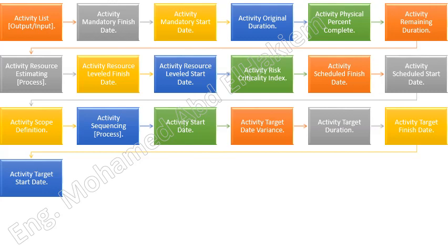Activity target start date. A point in time established by schedule network analysis for beginning the schedule activity within a specific version of the project schedule. Activity total duration. The total number of work periods in calendar units to complete a schedule activity. For schedule activities in progress, it includes the activity actual duration plus the activity remaining duration.